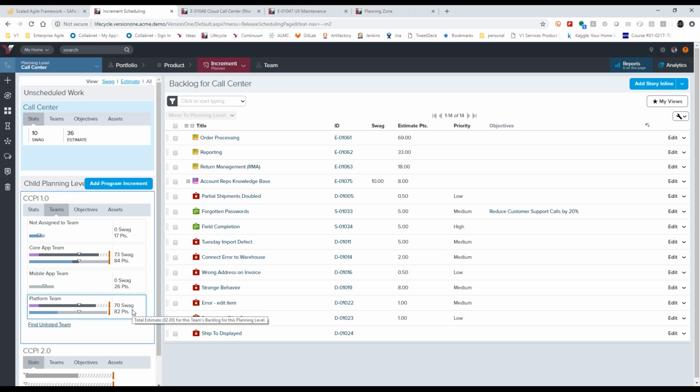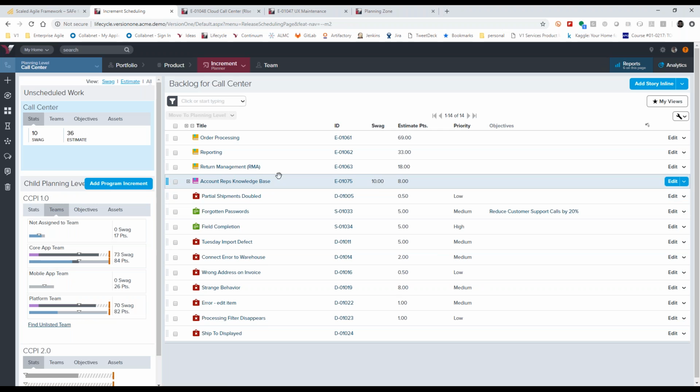Again, in my example, this is a fairly straightforward thing because I have a fictional company that has feature teams. So teams are aligning to specific features, and all the stories in that feature are being estimated by the team. So there's an alignment across those estimation practices. So when we get into this exercise, I can pull an entire feature in from the backlog and drop it directly onto a team. And the expectation is that, you know, a 1 means a 1 for that team, and that at a micro level that we're making the right decisions for allocation.